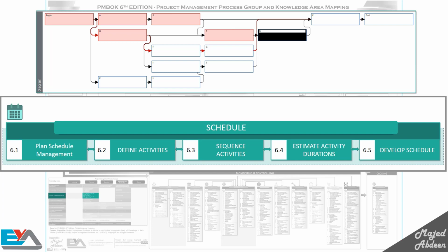All the activities in any project should be connected to at least one other activity, so you can't leave any standalone activities. For people who work on software, it's like the relationships between database tables, with the difference between the logic and the attributes of the relationships between tables and the links between the activities here.